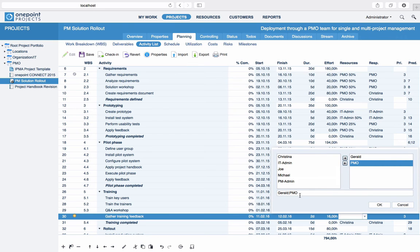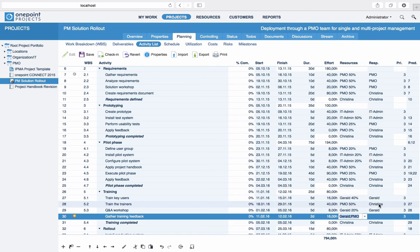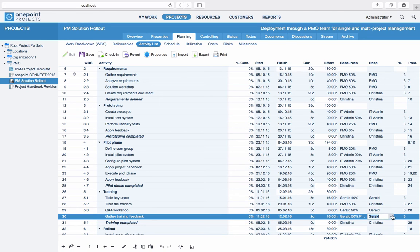When typing in resource assignments, you can also specify hours or percentages. By default, the first assigned resource is also used as the responsible resource, but you can easily change this in the Responsible column.